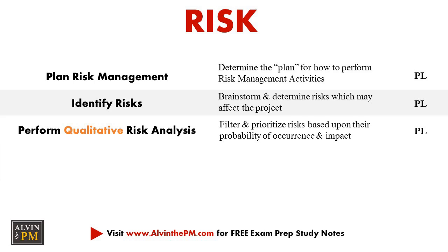We'll evaluate the risks based upon how likely they'll occur, as well as the magnitude or the impact that they have on the project. We'll filter through this list of low, medium, and high risks, and those which have the largest impact and probability are the ones we'll be focusing our efforts on.